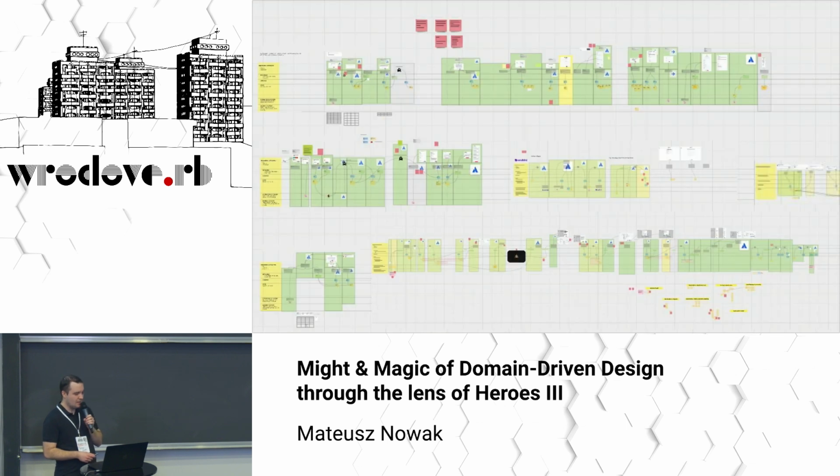And if you are thinking, how does it look in a real project? You may see it from a helicopter view. This one was almost finished, so we don't have red slices there, but there are still a few yellow slices. Most of them are green, so it's almost done. But it's also a nice way to present the progress to a company board, because it's easy to see how much we have to do and what we have done so far. Thus, you can minimize the view and look for the colors.